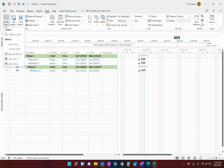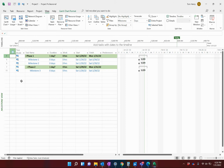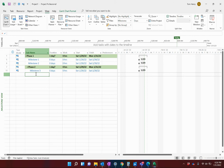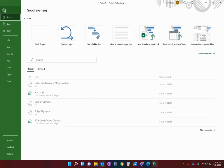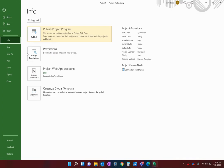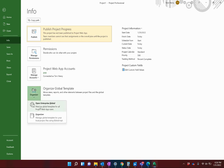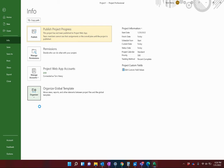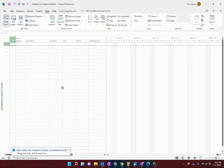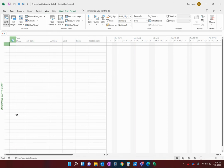The Milestone View is now saved locally. What I want to do next is save this to the Enterprise Global so that everybody in my organization can access it within Project Online. I'm logged in as administrator. I'll go to File > Info > Organizer, then Open Enterprise Global. Be very careful — do not click anywhere in the enterprise global file, because clicking anywhere in Microsoft Project will save changes to that view.